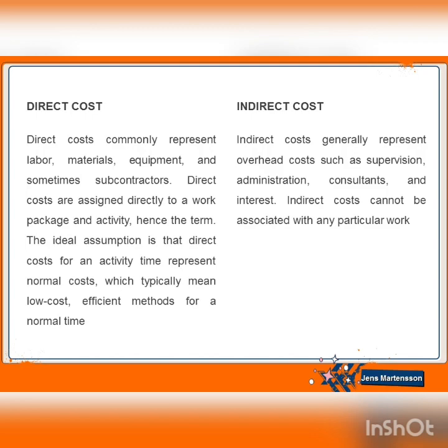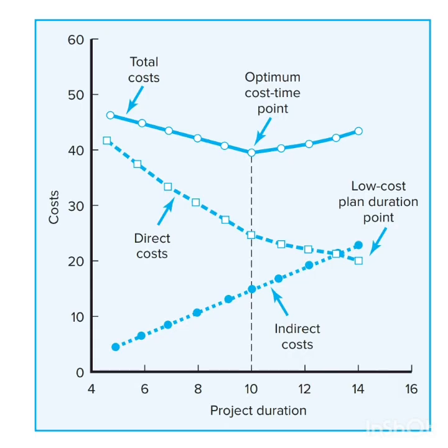Now we look at the graph of project cost. As we see, the total cost for each duration is the sum of the indirect and direct costs. Indirect costs continue for the life of the project, so any reduction in project duration means a reduction in indirect costs. Direct costs on the graph grow at an increasing rate as the project duration is reduced from its original planned duration. With information from a graph such as this, a project manager can quickly judge any alternative, such as meeting a time-to-market deadline.